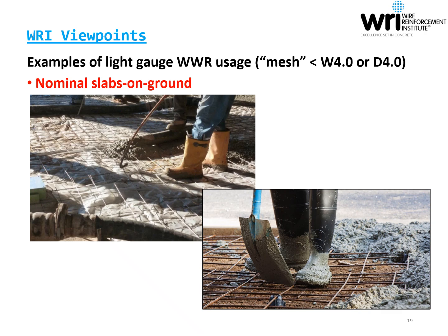In contrast, if the construction is to be executed as part of a design-build model, specifier-contractor collaboration should be baked in from the start of the project, with issues related to execution of a particular design intent largely resolved before they actually become issues. Regardless of the project delivery mechanism, there is no substitute for early communication. It is an obligation needed to be upheld by all stakeholders. Light gauge welded wire reinforcement is a viable reinforcement solution for slabs on ground, but consideration for the steps needed to execute this solution is the responsibility of both the designer and the contractor.